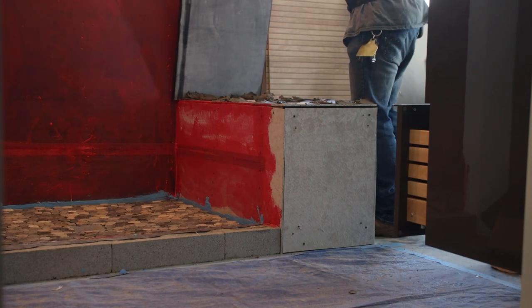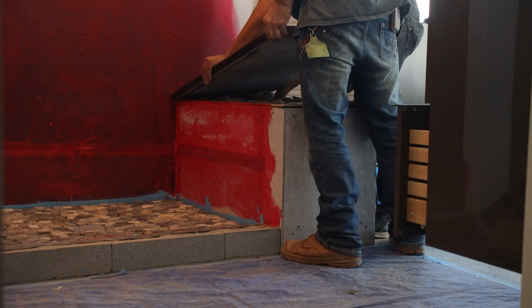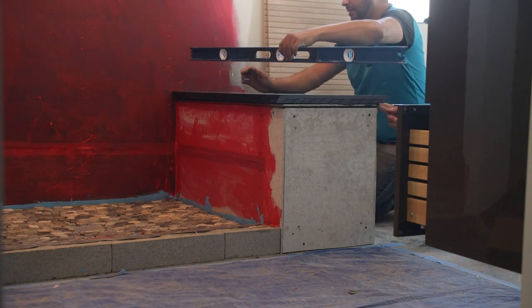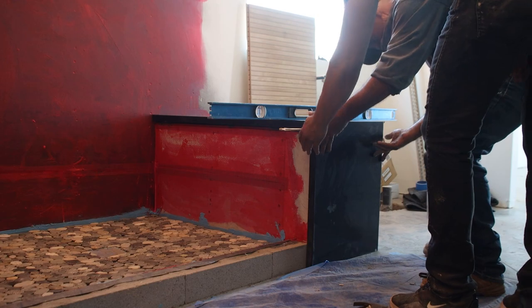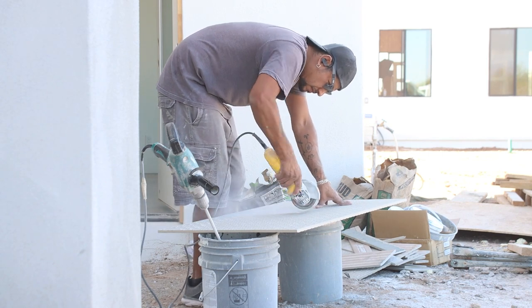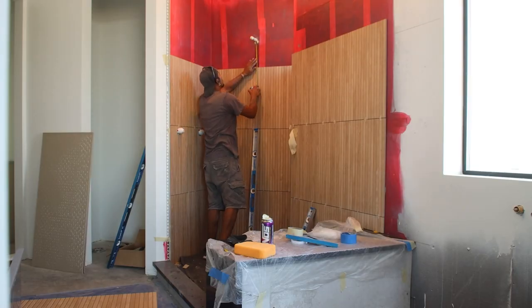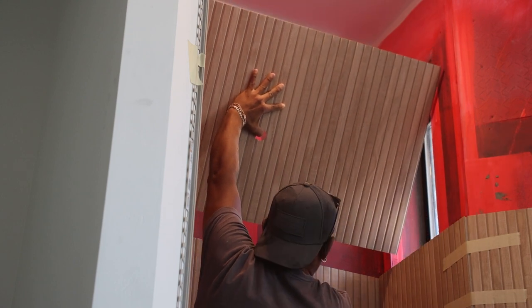I'm sure I'm going to receive plenty of crap from some of you guys in the comment section below because we chose to hire a tile installer, although I'm fairly experienced with tile and could have done the installation myself. Please keep in mind that at this point in the build, we were running behind schedule, which would cost us more interest on our construction loan. I was homeschooling two children while continuing to work on other places in the house, and the last shower that I installed took me over 3 weeks. Though it may sound counterintuitive, I've learned from my general contractor father-in-law that sometimes hiring an affordable professional can actually be a cost-saving method.